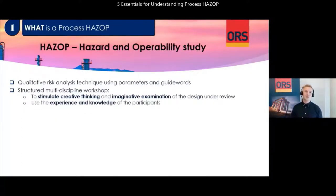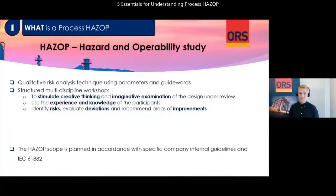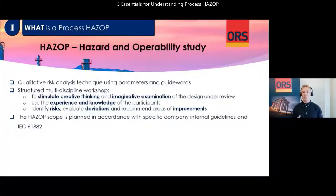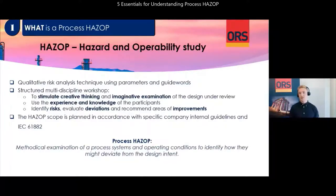The workshop intends to use the experience and knowledge of the workshop participants to identify risk typically related to consequences towards personnel, the environment, economy, and reputation. The HAZOP scope is normally planned under specific company internal guidelines and IEC 61882. IEC is the International Electro-Technical Commission and is a worldwide organization for standardization. The standard describes the principles and approach for a HAZOP study. In short, a process HAZOP is a methodical examination of a process system and operating conditions to identify how they might deviate from the design intent.